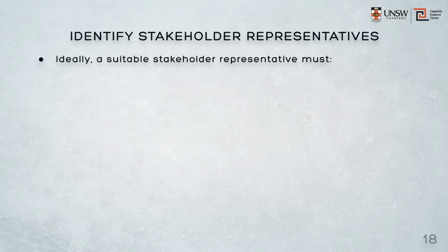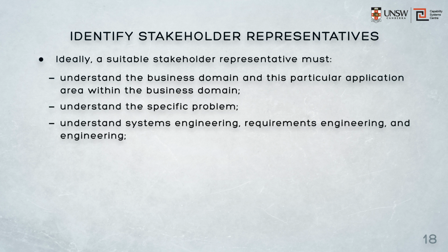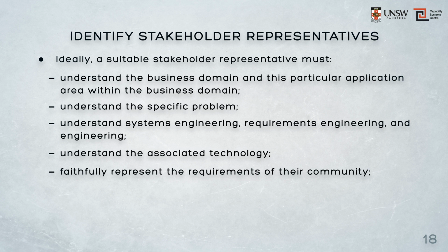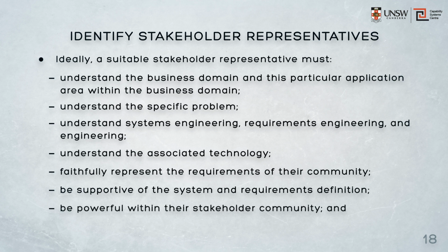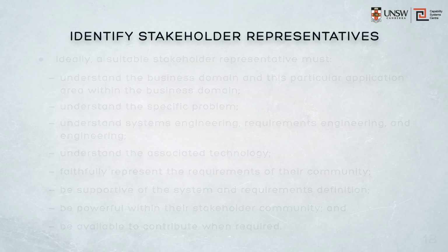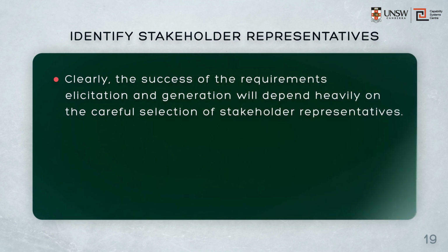So ideally, a suitable stakeholder representative must be able to understand the business domain and the particular application area within that domain. They must understand the specific problem. They must understand systems engineering, requirements engineering, and engineering. They must understand the associated technology. They must faithfully represent the requirements of their community. They must be supportive of the system and the requirements definition process. They must be powerful, at least within their community, and they must have time to be able to contribute where required to the process.